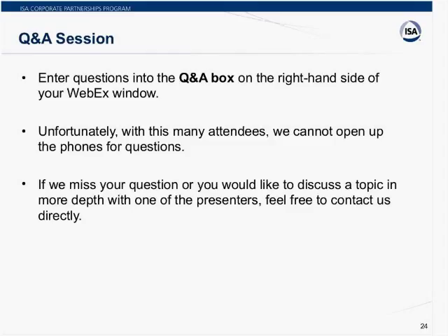Larry asked another question. He said, overall, how much money do you expect to save by taking a more proactive FEL approach versus not having one? 10%, 20%? That's a great question, and I'll refer back to the couple of slides we looked at. I think straight up off the capital cost, you should see a 15-20% advantage versus your peers or past practice, depending on where on the curve you are.